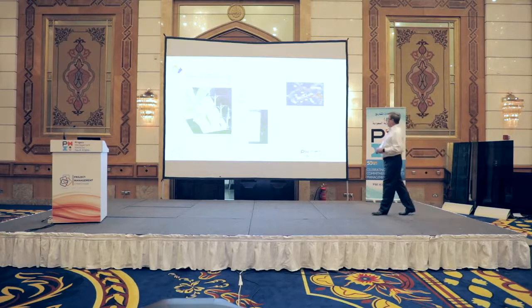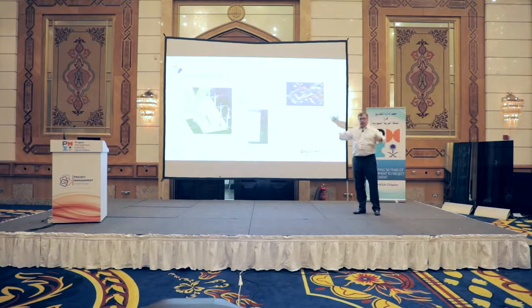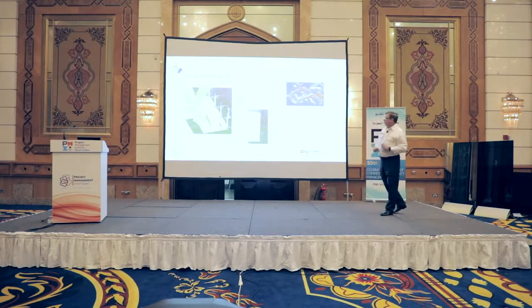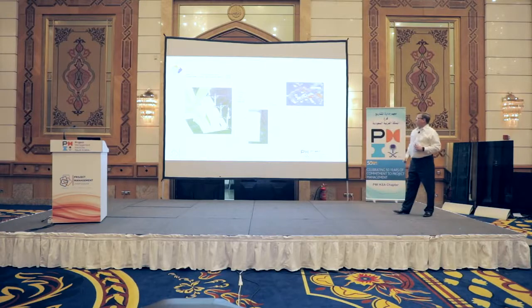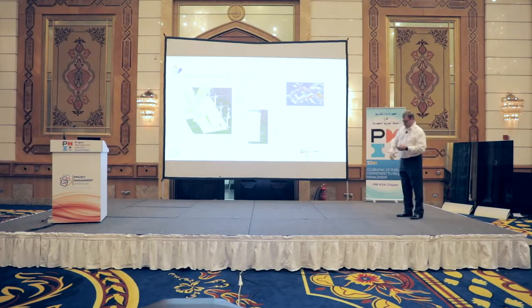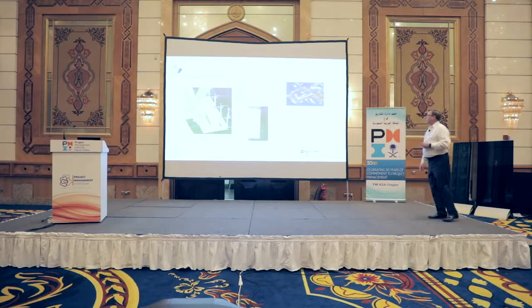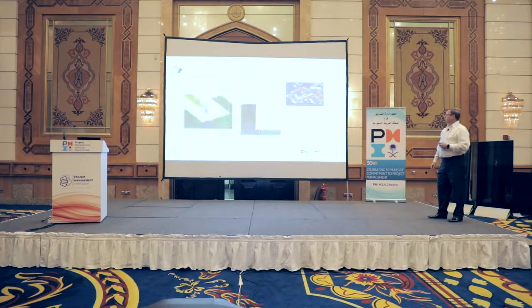So here we see, when we put down the pad that the crane will sit on, there are several pipe stanchions in the pipe rack that are going to interfere with the plan. Everything in pink is a hard clash. Instrument panels, existing equipment.